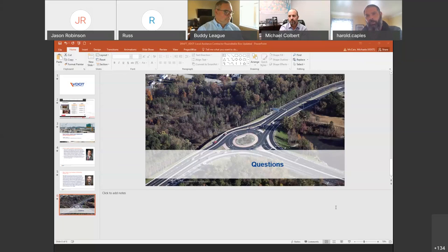Well, I think that also plays into how you're scheduling your work. Correct. That gives you the ability to say, based on your existing workload or capacity, you need to keep your crews working, but long term, this project might be a stretch for you and might be a little more aggressive than you'd like to be. If you knew another project was coming 45 days or 90 days down the road, it gives you a better ability to project workload from a capacity standpoint for your company.